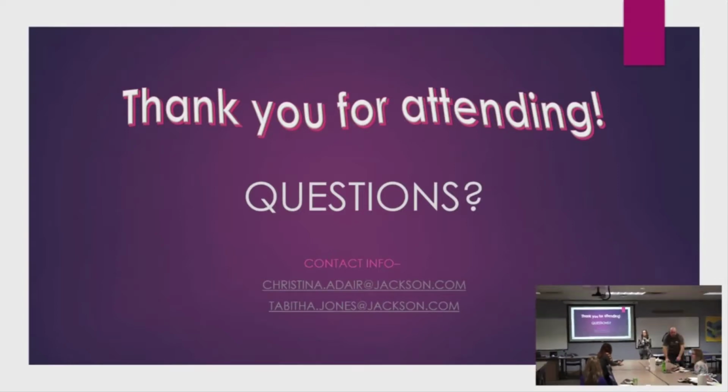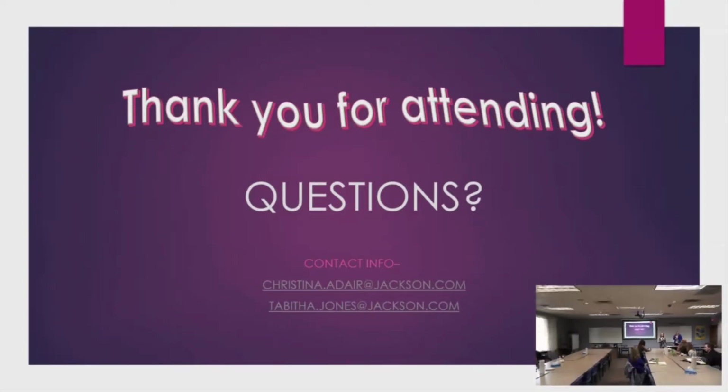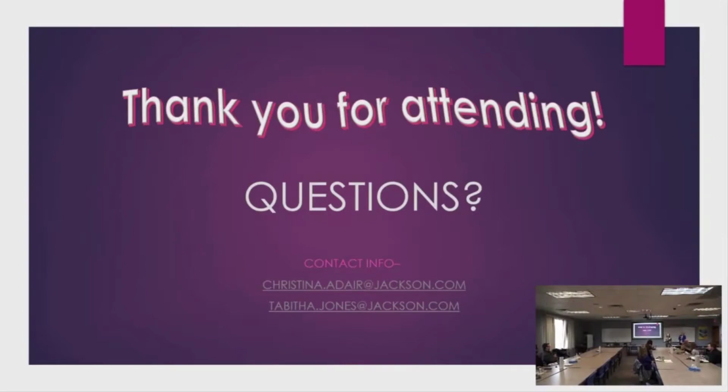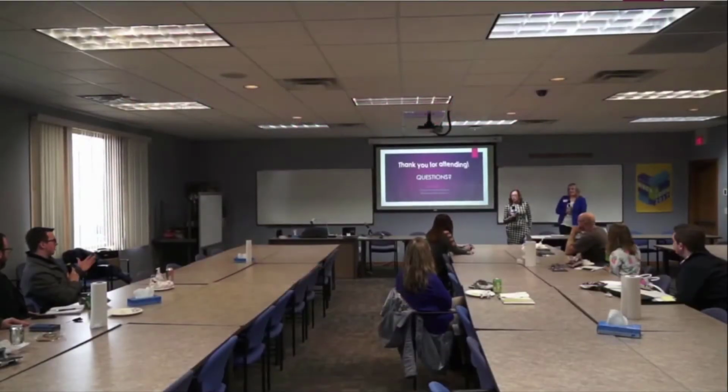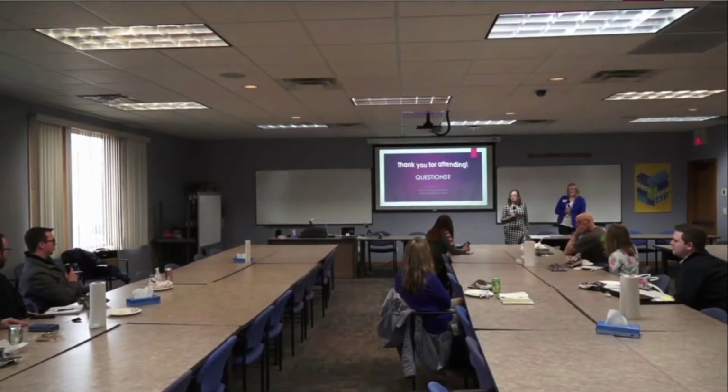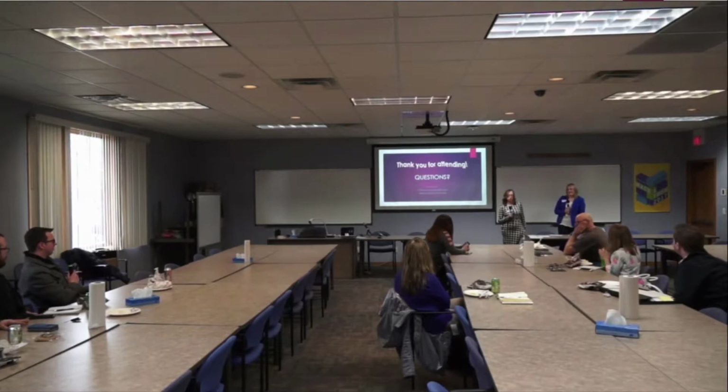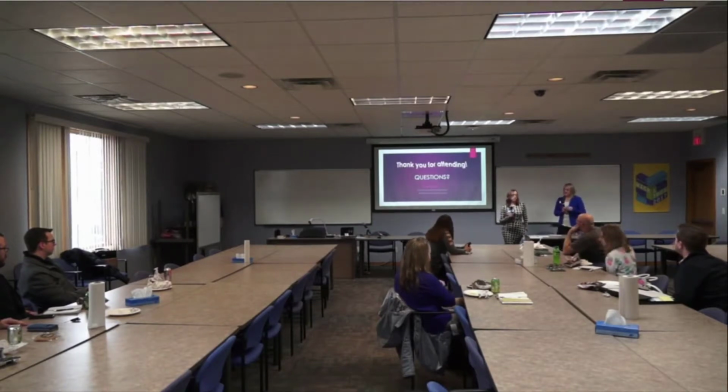So my question is, when you get to the end of your priority list, what happens? Do you ever pick up things that you previously dismissed as not important enough to test, assuming you have more time left in the sprint? In a sprint, no. We find more important work to do. In a waterfall project, if there's time, we would go to the low priority test cases and execute those. And I would say as long as you've done some exploratory testing or experience-based testing first.